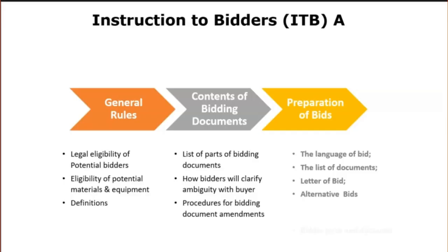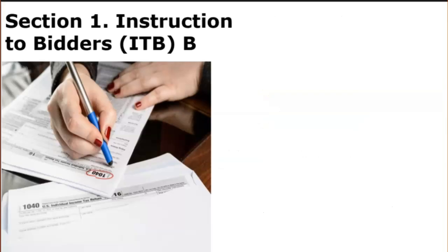You will find information relating to how the bidder needs to present its bid, prices, and any potential discount if it is allowed. Still on instructions to bidders, you will see information like the currency options for the bidder to present its bid price and the currencies of corresponding contractual payment by the employer.